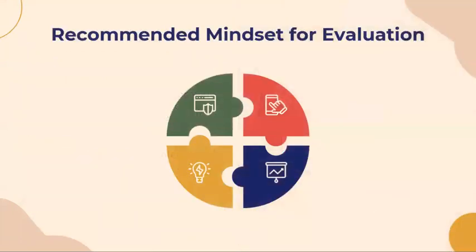So what should be the recommended mindset for evaluation? Okay, so first, evaluate early and often. When evaluation criteria are defined early, they can be applied to a project in progress and provide input into the development of test strategies, test plans, and test cases.